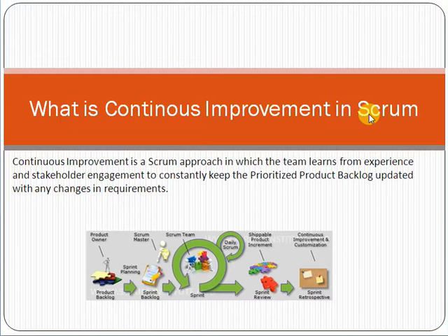However, in Scrum we divide the work into multiple chunks, which are called sprints. If you have to deliver a project of 40 tasks, we divide these 40 tasks into, for example, 4 sprints, and each sprint will contain plan, develop, test, and deliver. This is the concept of Scrum, a project implementation methodology.